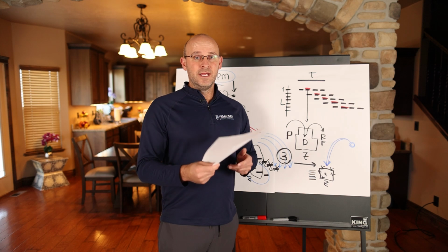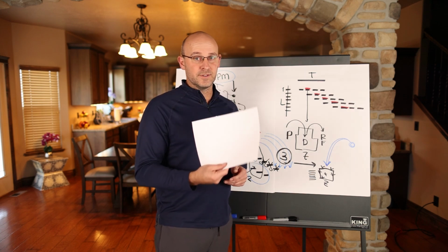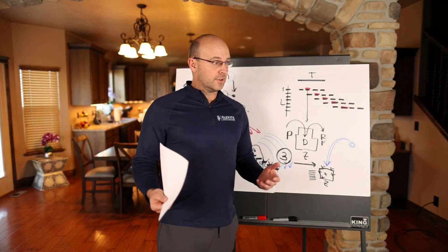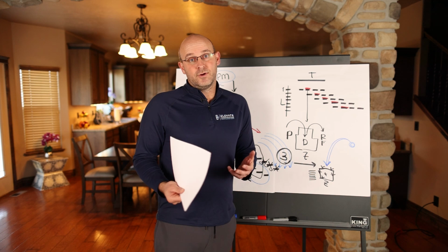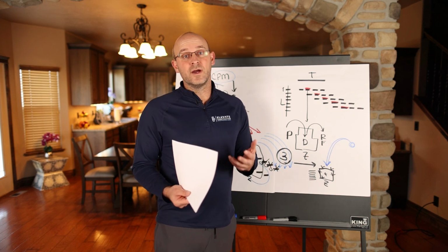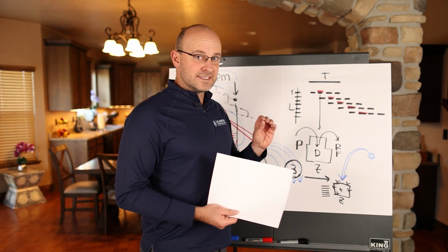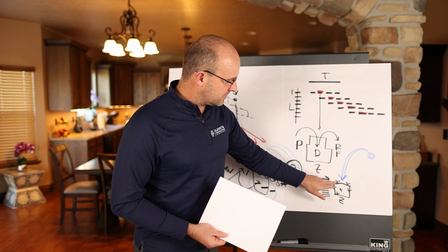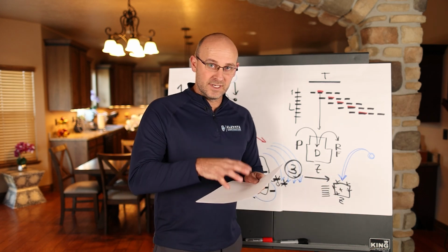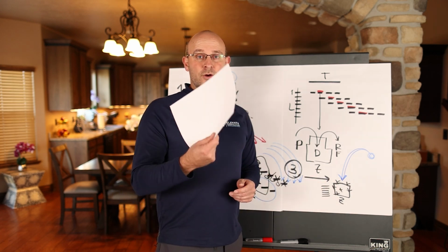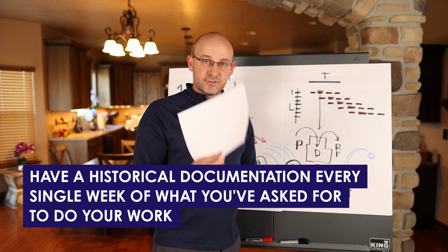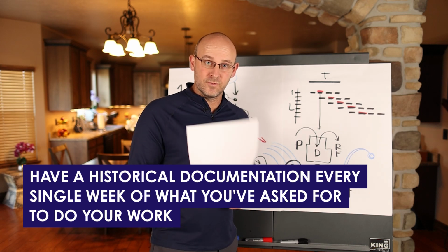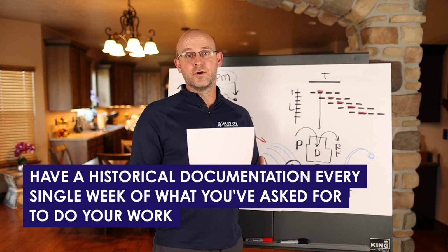But if you do this, which is a discipline, your general superintendent or your project executive or your foreman out there on the site, whoever's doing this, will have to establish the flow and then take pictures of that zone and say, this is what we need to do our work. You have record documentation, historical documentation every single week of what you have asked for to do your work.